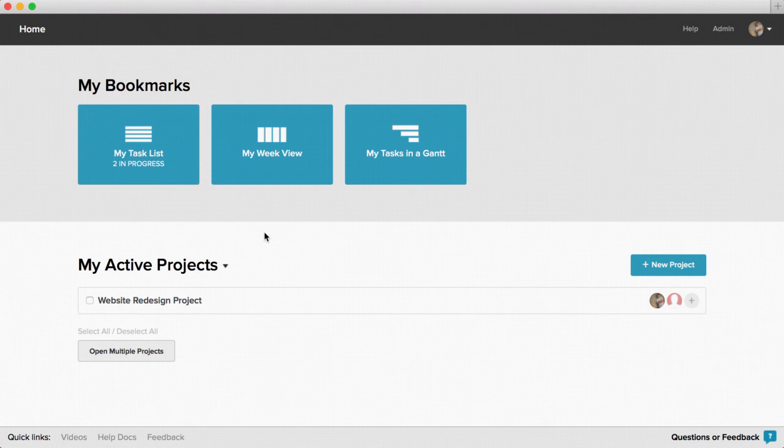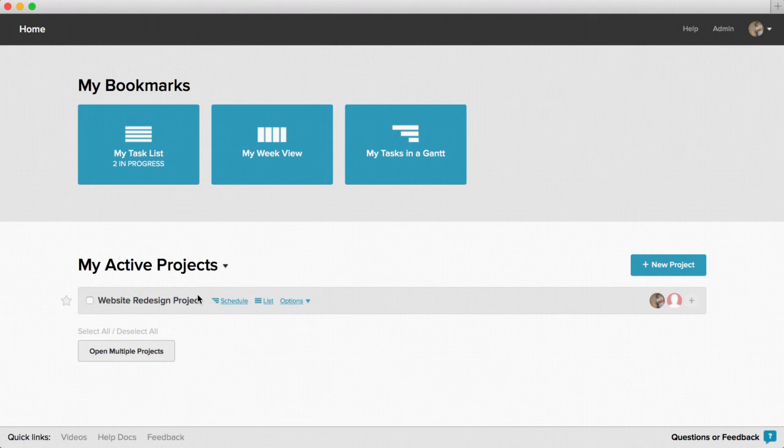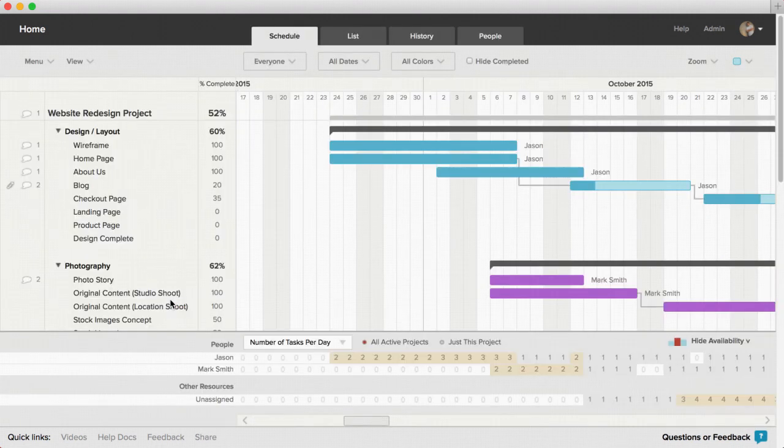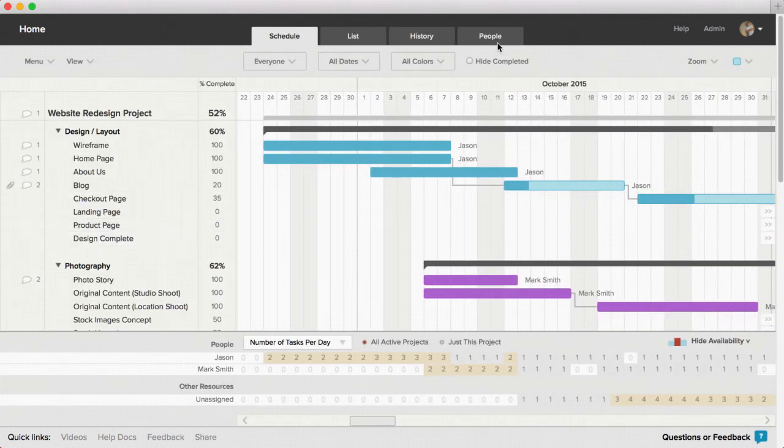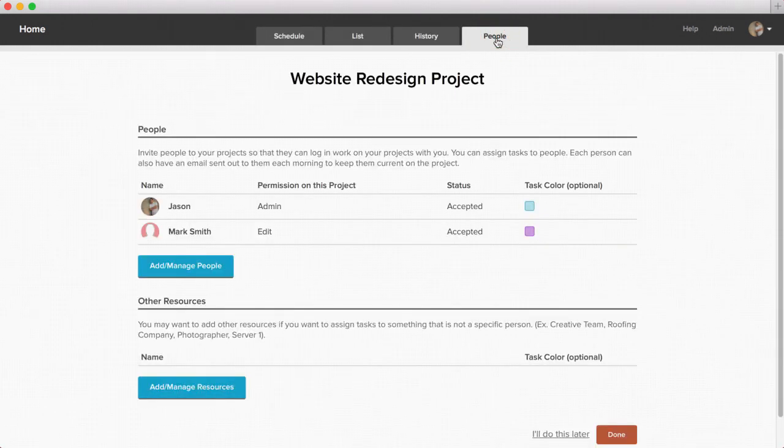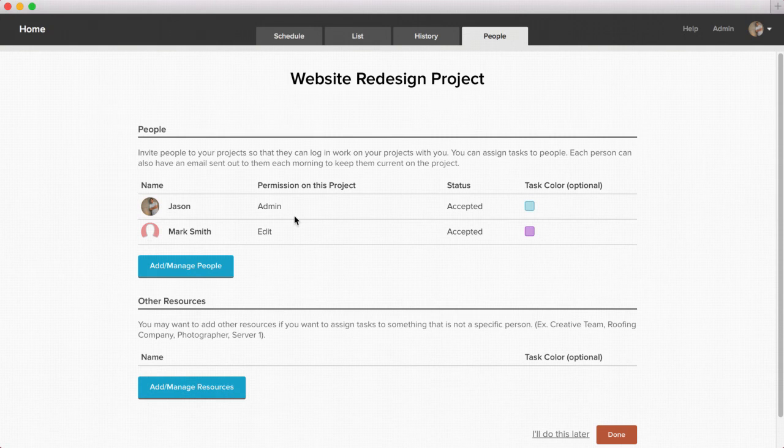Inviting people to your project in TeamGantt is simple and quick. Simply open the project you want to invite people to and click on the people tab at the top of the project. Then click on the add manage people button.